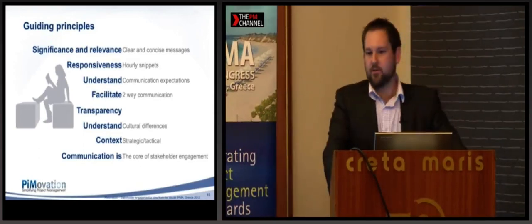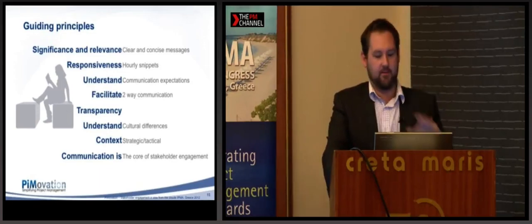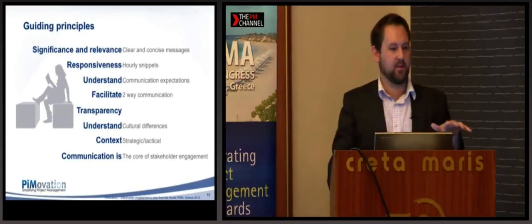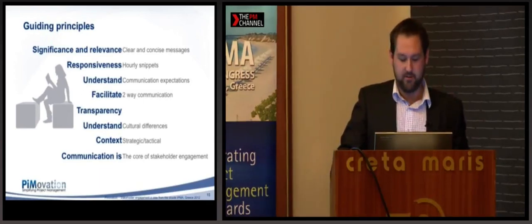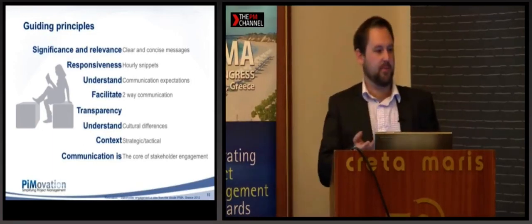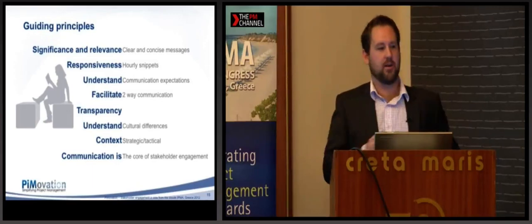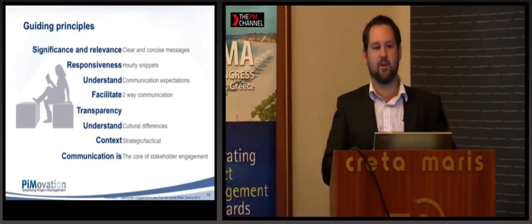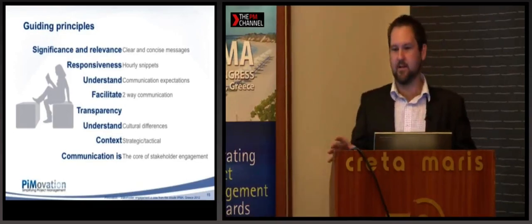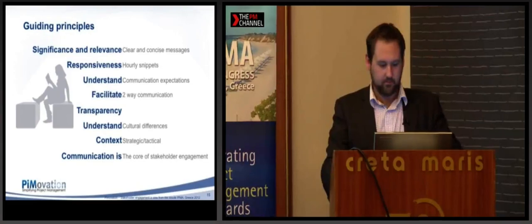Could be certain words you don't use or certain phrases, but just have an understanding of that when you're going out through the internet, you can reach a mass audience. So have an understanding of those cultural differences. And you want to always maintain the context, whether it be strategic or tactical, on your stakeholder groups. So try and send out two versions of the information, one aimed at the strategic sponsors and others at the tactical project management, project team stakeholder groups.